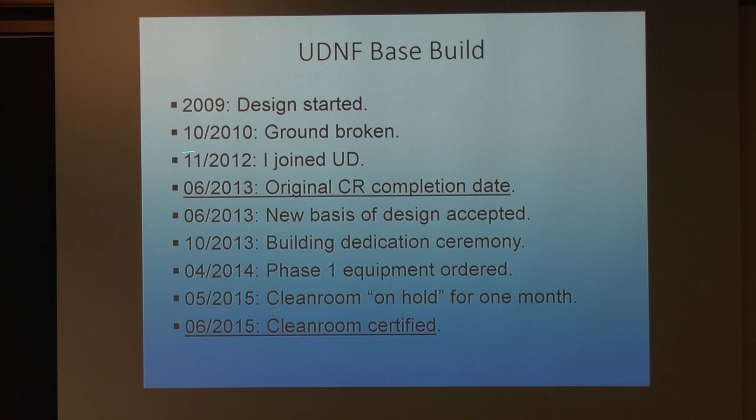What happened in June of 2013 is that my new basis of design was actually accepted by the design team. So I went and rewrote a new basis of design. The building was completed on time, October 2013, grand opening for the building. University of Pennsylvania was opened roughly around the same time. As we were building the existing cleanroom, we also started the process for what we call the phase one tool install. So we ran those projects concurrently.